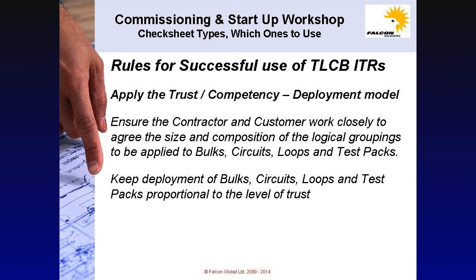Keep deployment of bulks, circuits, loops and test packs proportional to the level of trust. The trust, competency, scale of deployment model. Establish rules that determine a logical grouping. Tagged items, for example, that have in common the tag type, the location, its room or module or building. Ensure that all verification checks can be completed by the same engineers or technicians during the same visit.